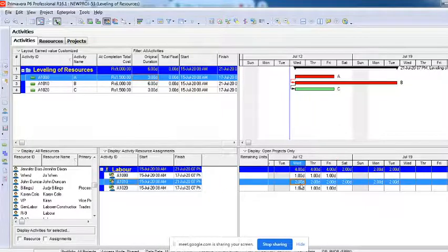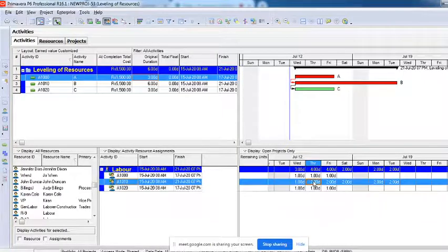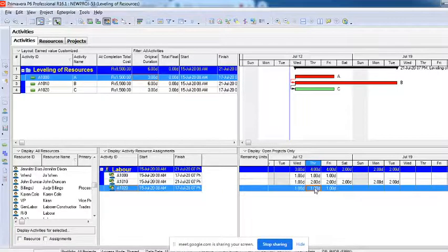So what you can do, either you can start it by using 1 1 here, or you can make somewhere 0 and then make 1. For example, activities A, B, C will start simultaneously on day 1, and as the work progresses, somewhere I'll give a halt. I'll say that no work will be done for activity C on these days, and then I'll assign that amount of work here. Can you see this? These 2 labors which had been assigned on Thursday, Friday, I'm delaying here. You can see it's 3 3 3.